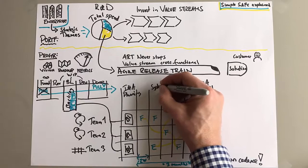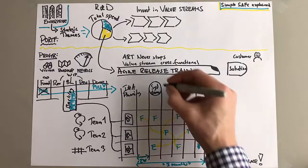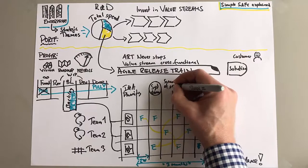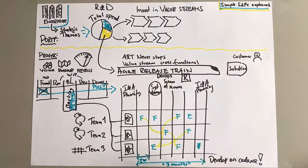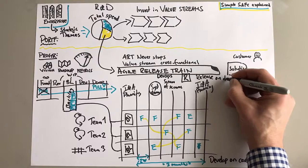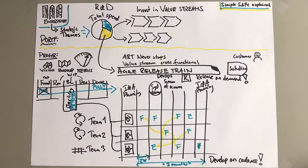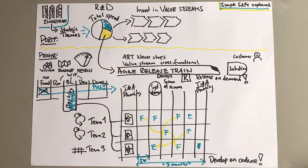Now up on the program level you have demos. Of course each team is working in sprints and demoing for their product owner. But you also do system demos where it all fits together. Very important. And you're releasing - we develop on a cadence and release on demand. DevOps can also lie up in the program area.